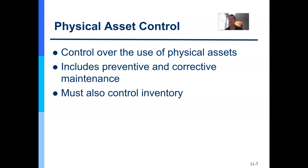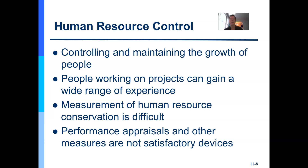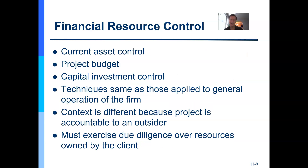What about inventory? If I have a widget maker, do I have parts waiting for the next step? We also have human resources control — though the PMI Institute now says 'monitoring human resources' because we don't really control people; we manage, coach, guide, steer, and lead them. We want to make sure our activity owners are managing their budget and staying on track. I'd look in the work breakdown structure dictionary and have weekly conversations with activity owners to ensure they're keeping up with their milestones, budget, and quality control.